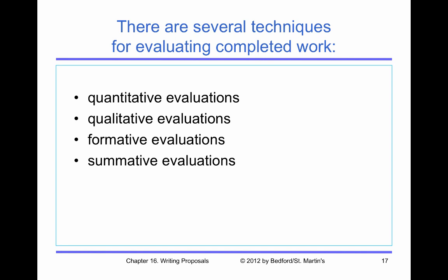Formative assessment helps to shape the project along the way. So maybe you're going to promise them periodic status reports. Those update them on the project and let them know how things are going. But they're also kind of reflective, in that they inform you about how well things have been going and whether you need to speed things up or what. Summative evaluation is at the end, so maybe you're going to promise them a detailed report when this project has been completed.